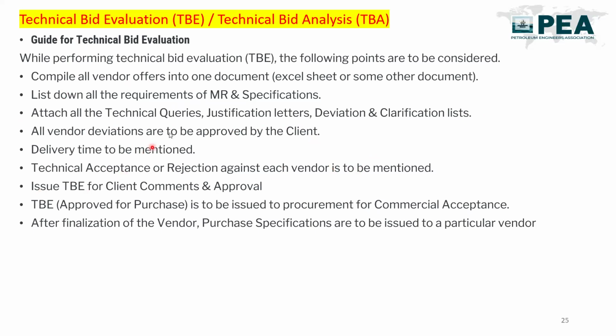And after doing all these activities, this technical bid evaluation report will be submitted to the client for comment and approval. The client will also review and give their comments if they have any. Then we will approve this technical bid evaluation from our side, and it will be given to the purchase department for the further issue of procurement for commercial acceptance.